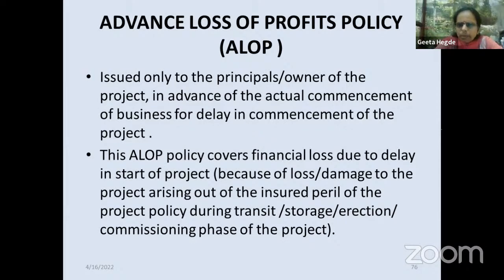Now what happens is, because of delay in the commencement of the project, it will result in delay in starting the business, and so delay in the profit that he would have acquired if the factory had commenced at the right time. So the ALOP policy covers financial loss due to delay in starting the project itself, because of loss or damage to the project arising out of an insured peril during the transit, storage, erection or commissioning phase of the project.